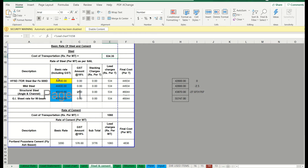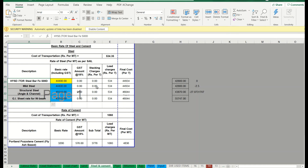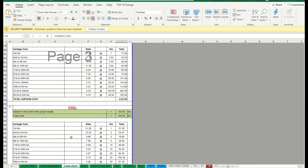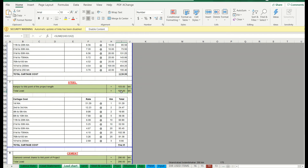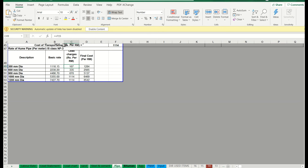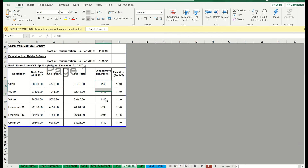For steel and cement, the prices are GST-inclusive so no need to add GST separately. Then we add lead charges. The lead charges are the same for different types — 534 rupees. From the lead chart, steel lead is 103 kilometers, and for 103 kilometers the cost is 534 rupees. Adding 534 to the base gives a total of 44,934 rupees per ton. Calculate cement and pipes the same way, and for bitumen also add the lead charges to the basic rate.